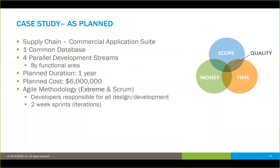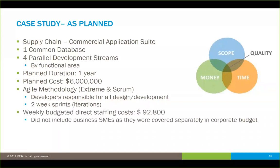The way this project was stood up was on that self-organizing concept where developers are responsible for all design and development. It was broken into two-week sprints. The weekly budgeted cost was just under $93,000 in direct costs of the actual project team. The project also included business subject matter experts, but their costs were not incorporated because they were considered overhead already in the corporate budget. So we're talking about direct resources only here.